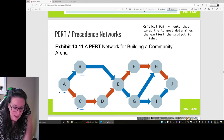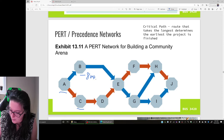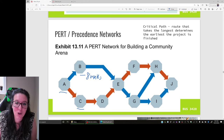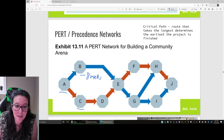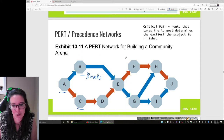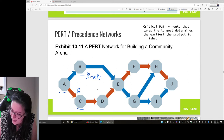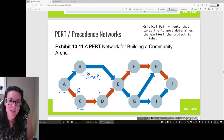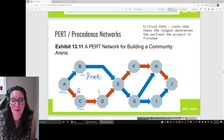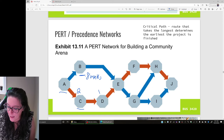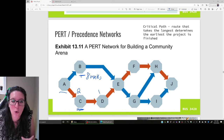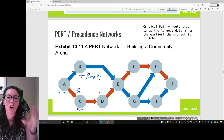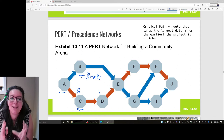When doing precedence networks, one of the things we're looking at is how long these activities take compared to each other and when the project could be done. Let's assume activity B takes eight months, activity C takes two months, and activity D takes one month. When looking at how long it takes to finish this arena, we recognize we have to do all steps A through J, but some can be done concurrently. So the total time doesn't come from simply adding eight months plus two months plus one month — we can finish it in less time by doing some activities at the same time.